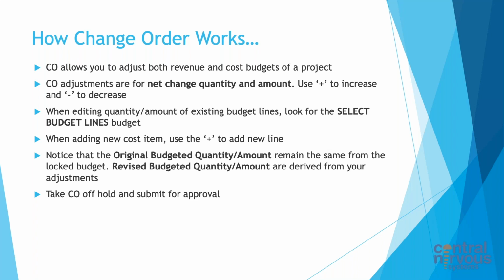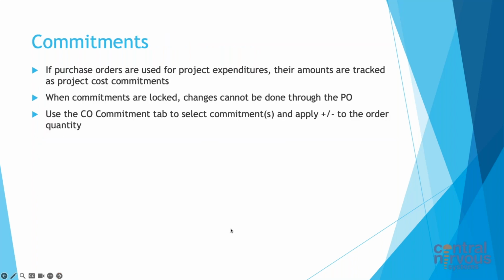Once we make those changes, we take the change order off hold and submit it for approval. Once approved, we go and release, and off we go.